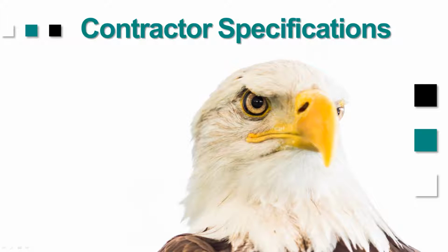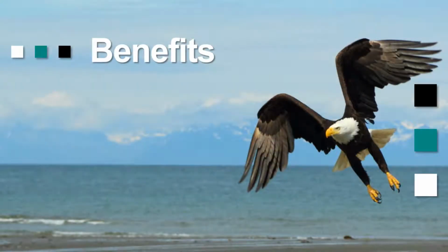So again, with something like P6-Scrubber, we could have run that through the scrubber and it would have told us exactly what they had included and if all those values were in the dictionary that were required. You can configure P6-Scrubber to handle each piece of data in the manner that you want it handled. So this is a huge benefit.